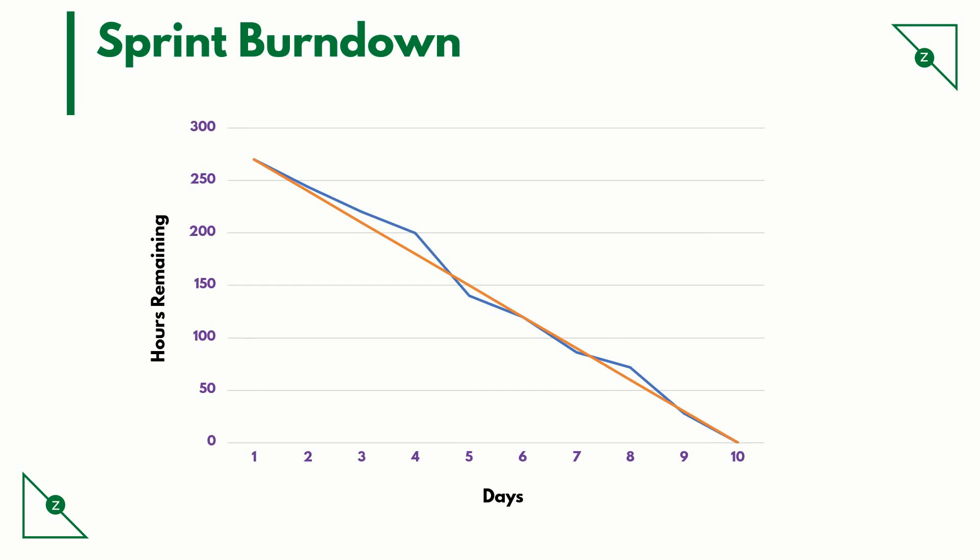Here's an example. On the y-axis, we have the hours remaining. On the x-axis, we have the days of the sprint. In this example, we have a two-week sprint. You can see that the graph starts at roughly 270 hours, which is the hours estimated by the team during sprint planning.